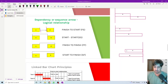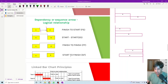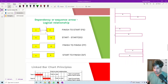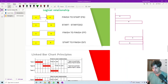The fourth type of relationship is start-to-finish. It means that activity B must finish when activity A starts. This type of relationship is not commonly used in construction or other projects. The three most common and most used types are: finish-to-start, start-to-start, and finish-to-finish. So these are the different types of relationship in general.